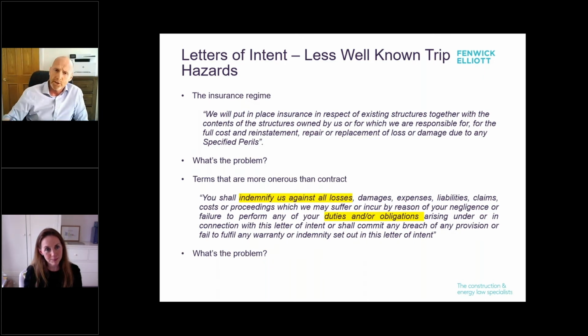Okay, so again, looking at a letter of intent, the risk of burning the building down is just as high on the Wednesday, having started on the Monday, as it is in week 32 of the project. It seems to me that risk sits there. And that contract, if you choose the option C bit, comes to the rescue of the contractor, if that's the case. So whenever looking at a letter of intent, skim down and just see what it says about insurance.